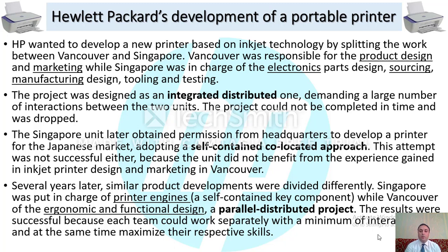Vancouver was responsible for the product design and marketing, while Singapore was in charge of the electronics design, sourcing, manufacturing design, tooling, and testing. The project, in the first place, was designed as an integrated distributed one, demanding a large number of interactions between the two units. The project couldn't be completed in time and was dropped.